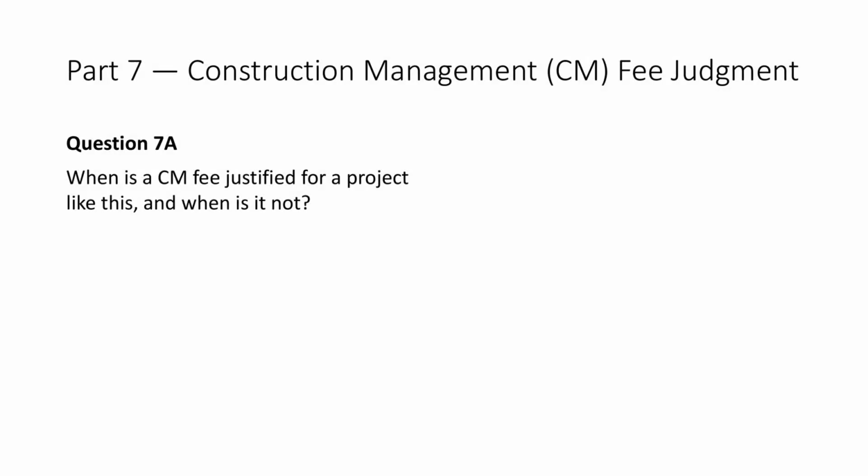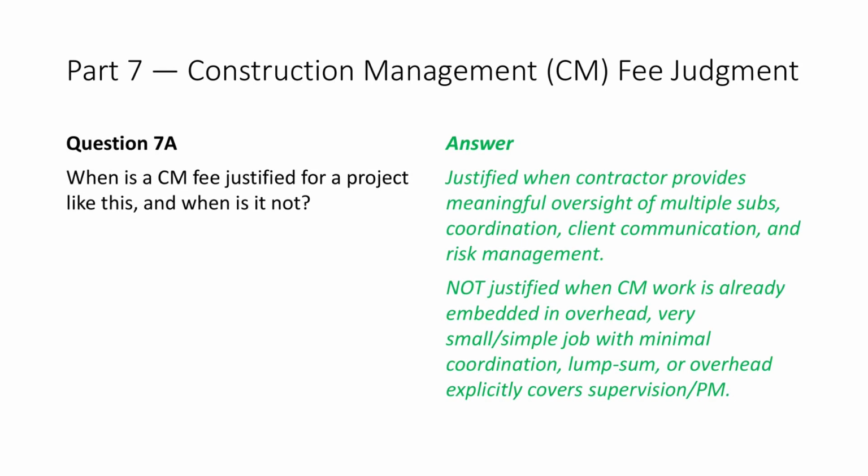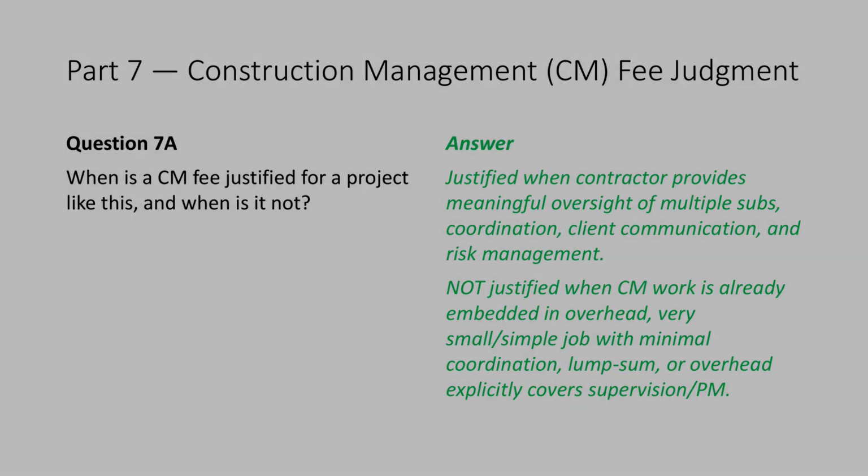Part 7. Construction Management Fee Judgment. Question 7A. When is a CM fee justified for a project like this, and when is it not? Explanation. CM fees are justified when real coordination, scheduling, and oversight are provided. They're not justified when management effort is already embedded in overhead or the job is extremely simple.